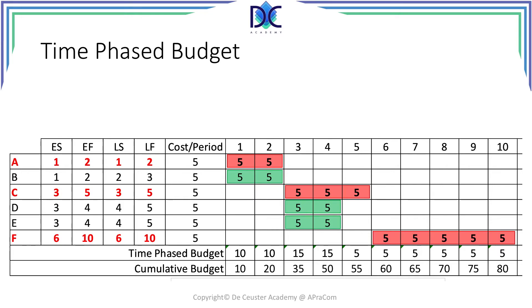Whatever the start position is — early start or late start — the total project cost, the budget at completion, will always be the same.